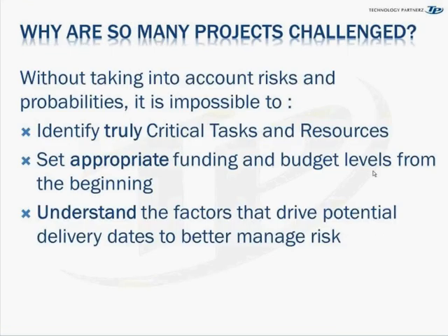So why are so many projects challenged? Well, most project managers and organizations don't really look into the risk from a quantitative point of view. So some tasks can appear critical when in fact they aren't. If you just rejig your schedule, a task can become uncritical. And if that happens most of the time, then you might be making bad decisions with bad information.